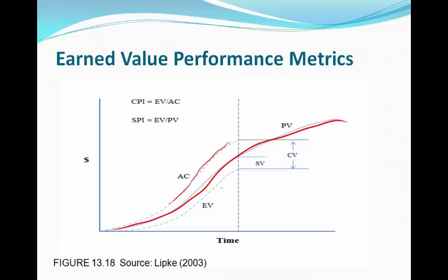You can think of that as your earned value. So you could have spent a lot more than what the current value of the house is, but if your client were to purchase it off you halfway through it being completed, they would only pay you the appraised value, regardless of how much you've actually spent on it. So that's one way you can think of earned value.